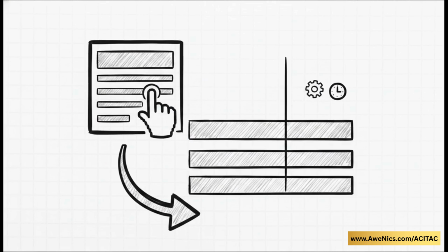Setting this up is super quick. You just right-click directly inside the Gantt bar chart area, select Progress Line, and click Display. You'll want to set it to the project status date. Now here is a real insider trick. You absolutely have to choose to display the line against the baseline plan. If you just use the actual plan, it's just going to draw a straight, unhelpful line. By setting it against the baseline, MS Project actively hunts for those delays. Oh, and don't forget to enable Show Date so you know exactly when the snapshot was actually taken.